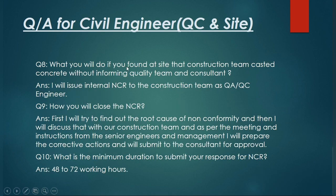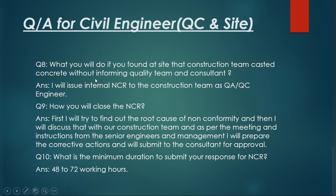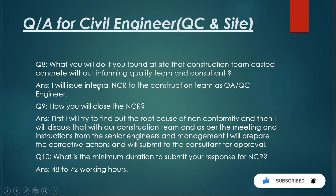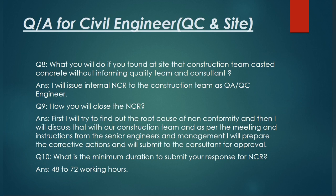Question number eight: what will you do if you find that the construction team cast concrete without informing the quality team and consultant? In my latest interview, the quality manager asked me this. My answer: I will issue an internal NCR — non-conformance report — to the construction team as a QC engineer. The construction team will then submit their corrective action. For unauthorized concrete casting, they must perform non-destructive testing first. If that fails, they must take a core sample from the cast concrete and check the compressive strength after 28 days.